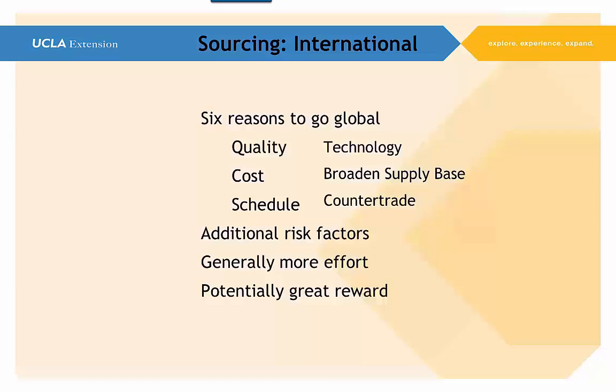If we want to broaden our supplier base, in other words, get more suppliers qualified, or maybe it's part of a project where we have to deliver something overseas, and one of the stipulations in the contract requires counter trade. We're building things here, but we have to have a subcontractor in that country or area so that they can get some industrial development too.